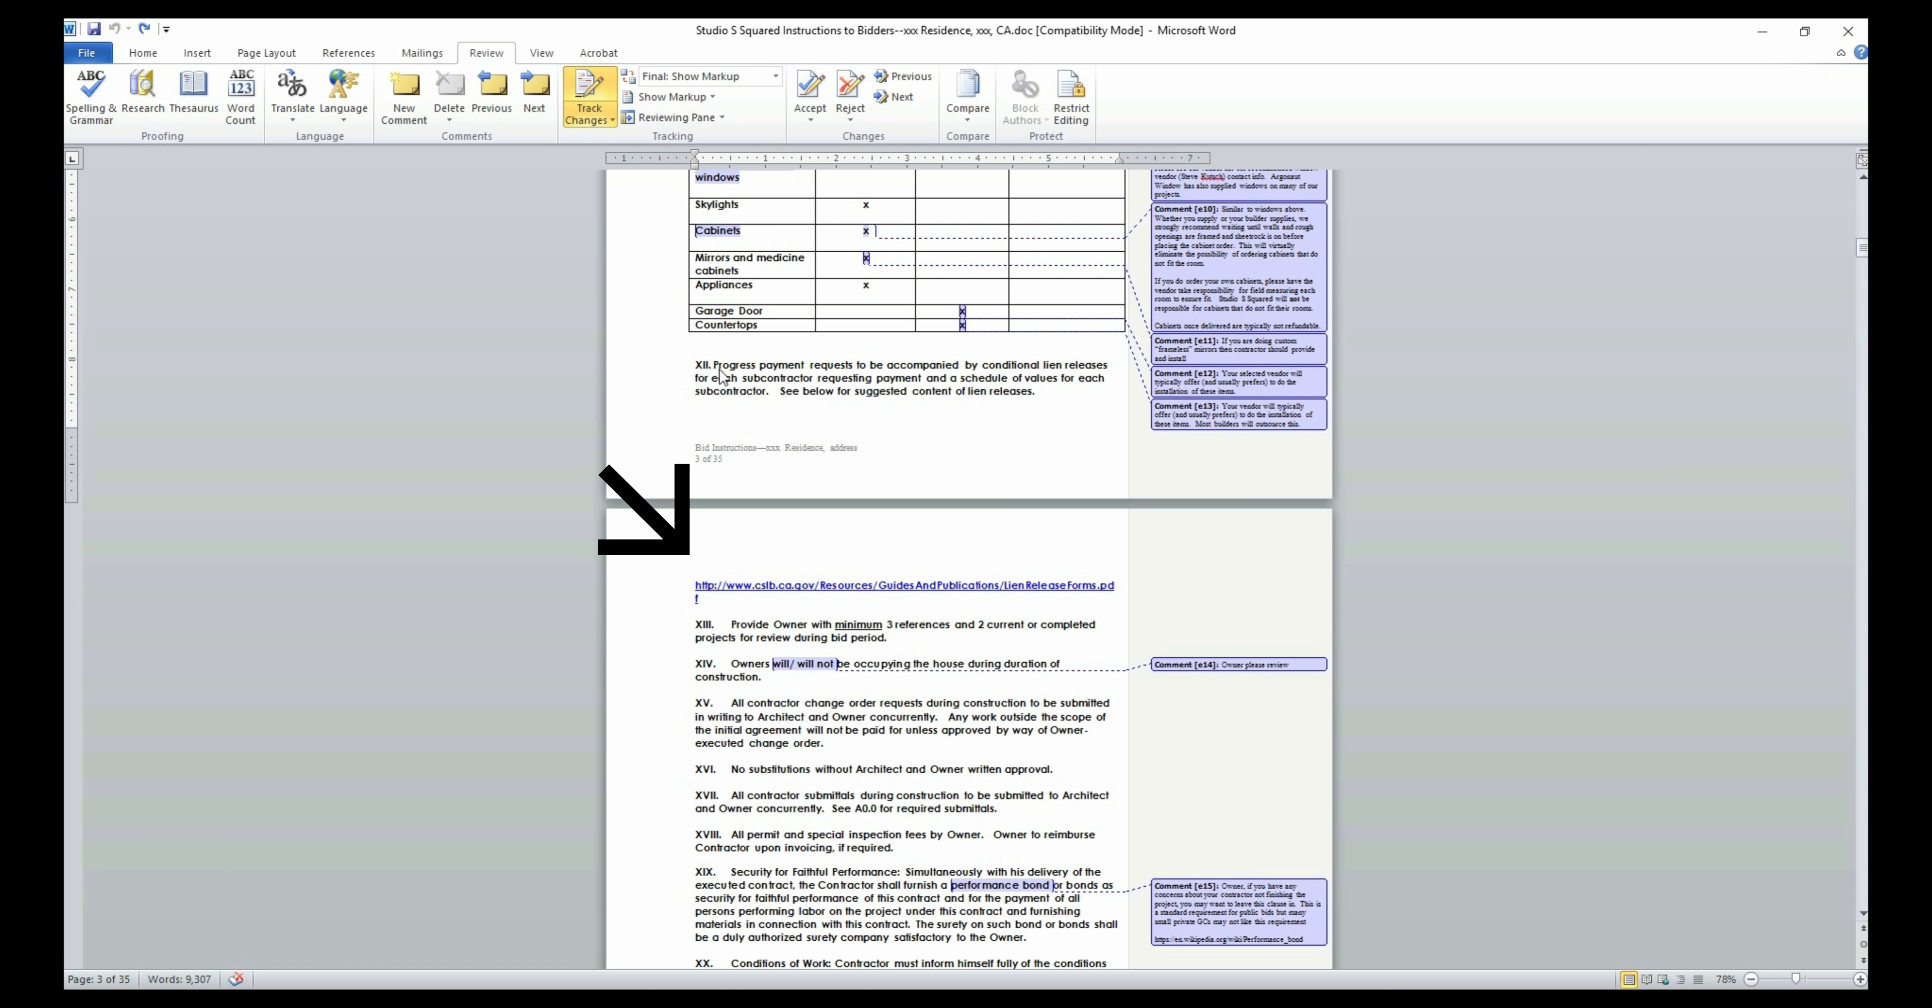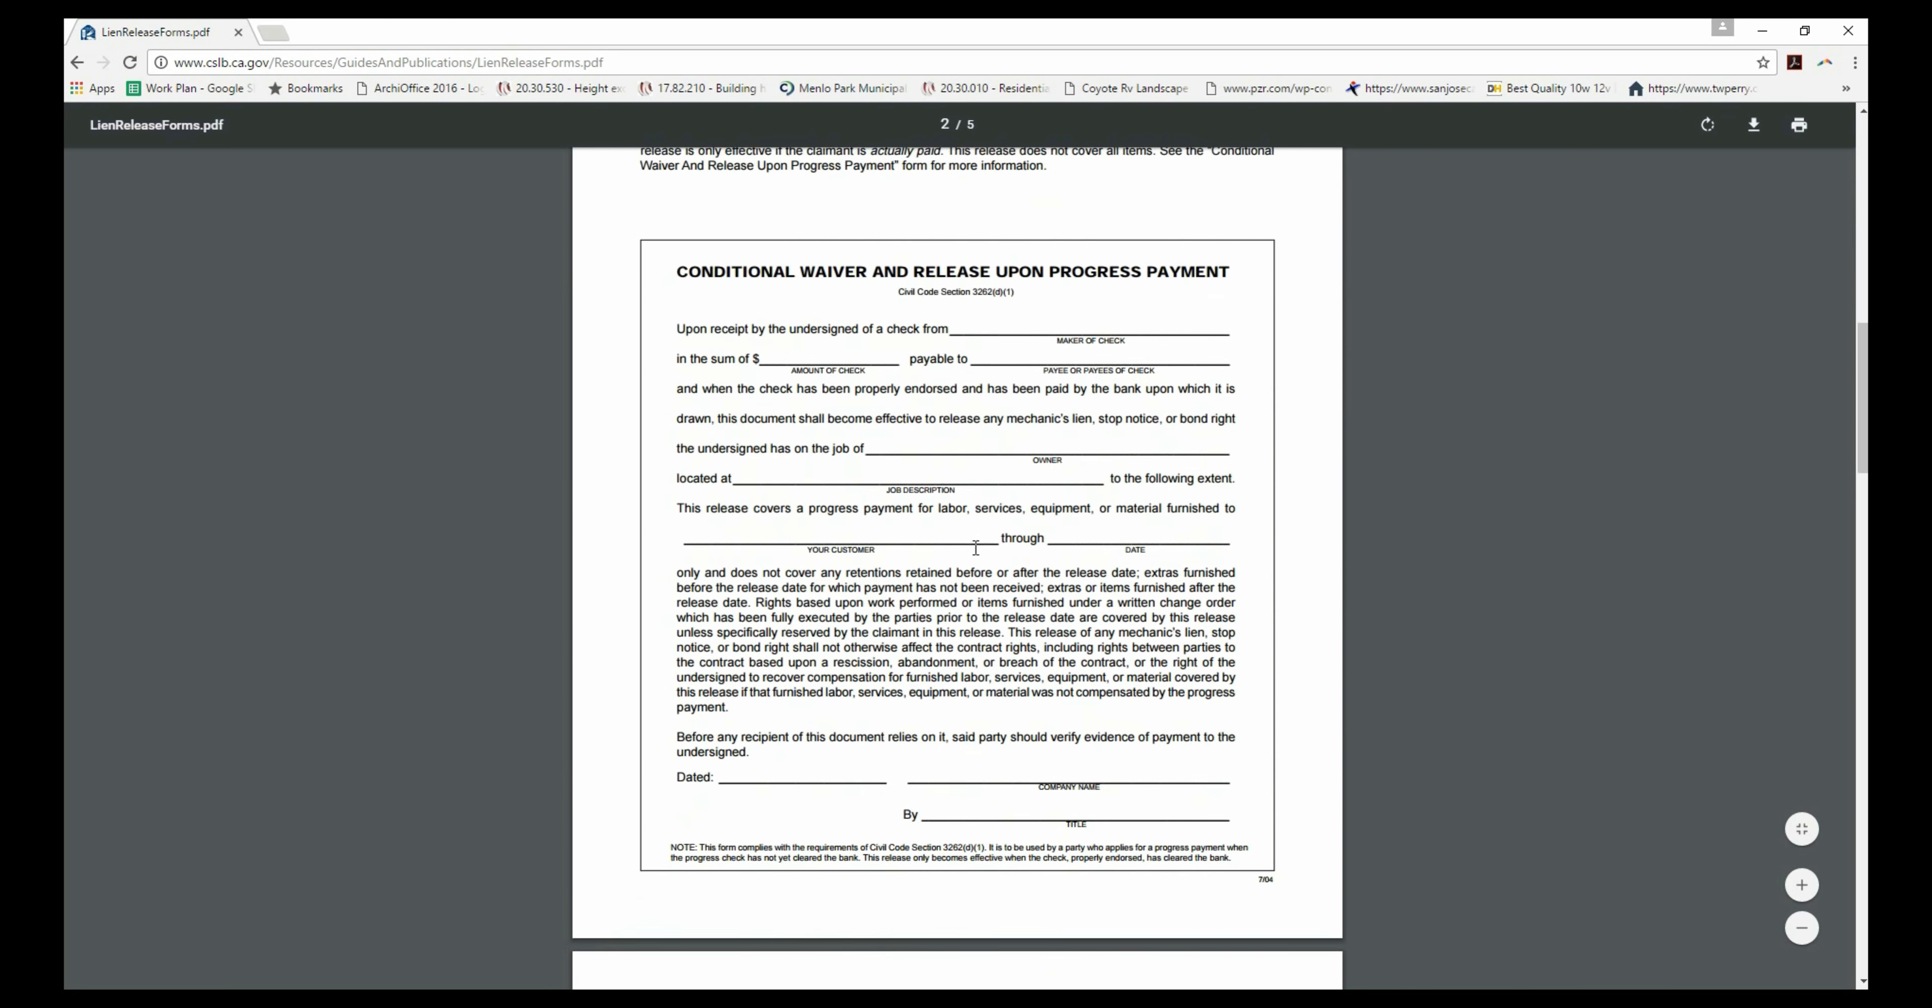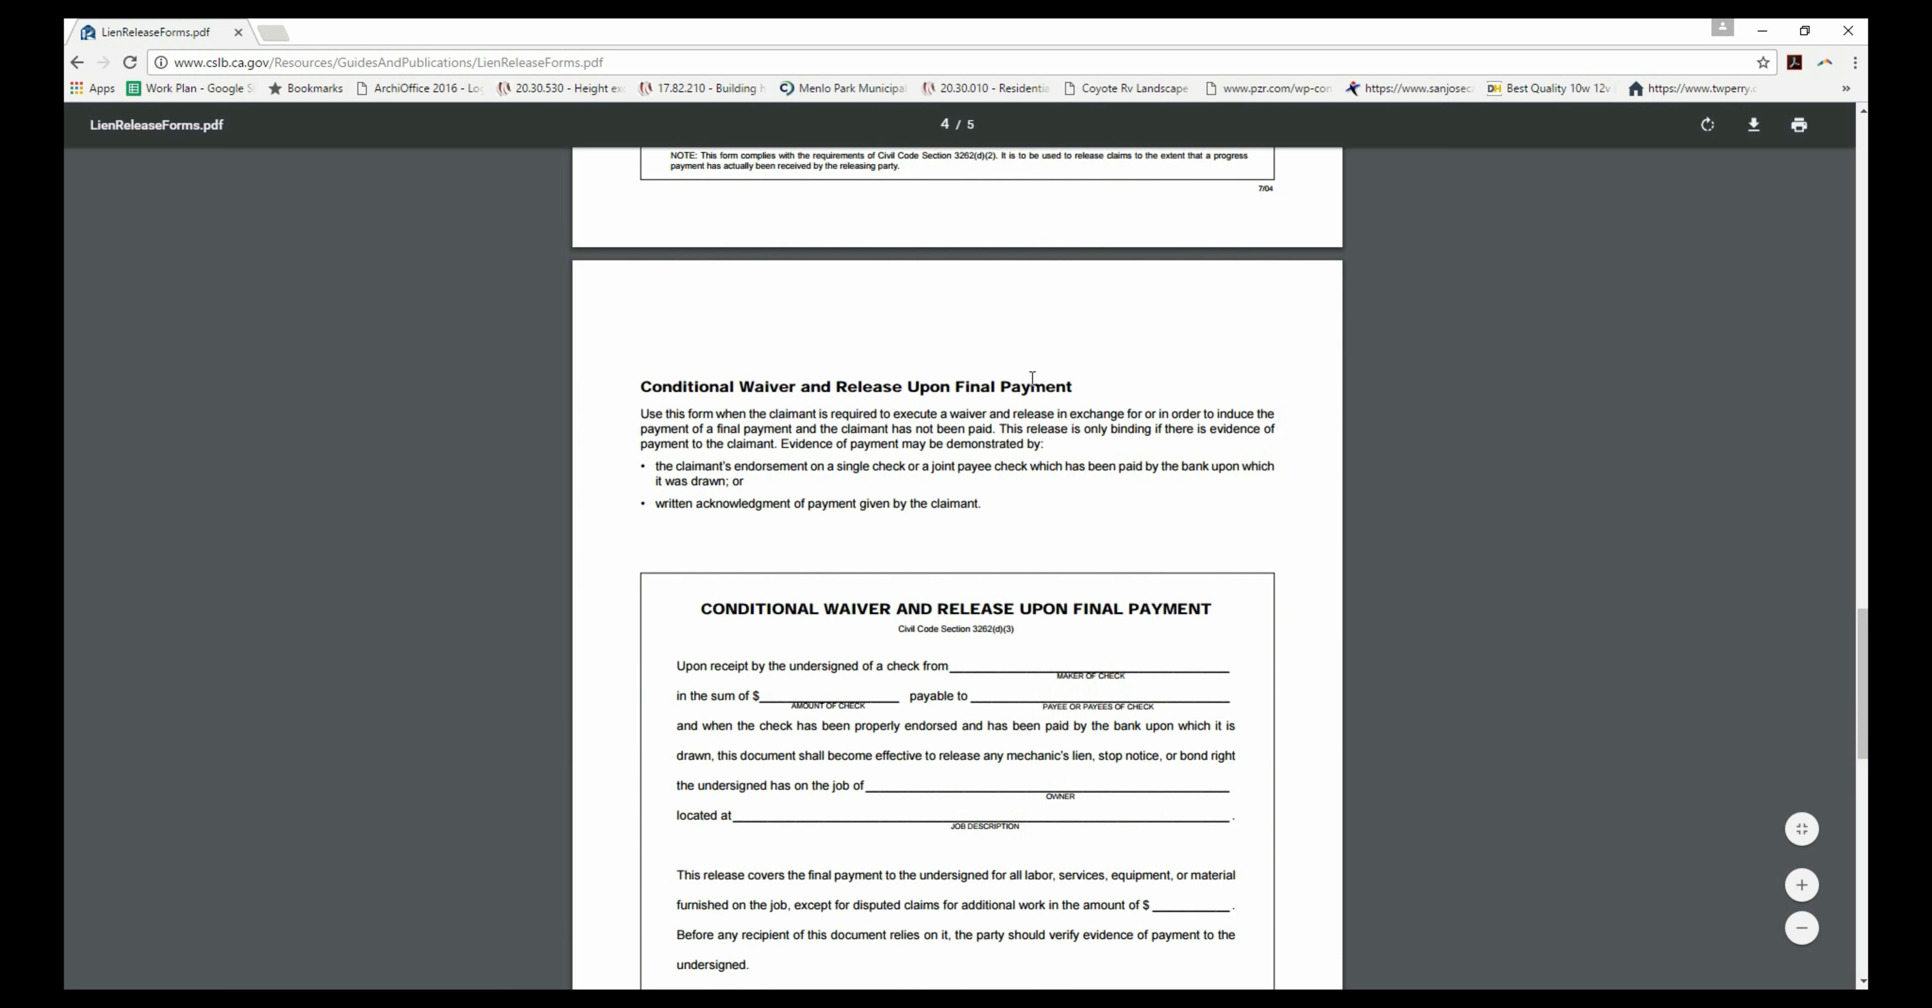The next section has a link to the lien release forms that your contractor and subcontractors will be using. A lien waiver is a document from a contractor, subcontractor, or supplier to the owner stating they have received payment and waive any future rights on the property of the owner for the amount paid. The progress payment option is the most commonly used type of lien release.